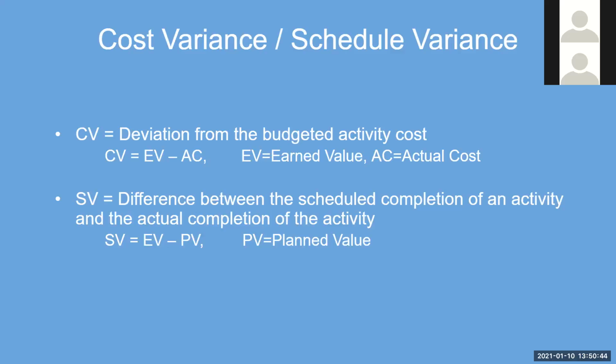But if your earned value, let's say the example I gave, is $200 after 2 months, and your team was so efficient, they spent only $100, that means your cost variance has a positive of 100. You guys have actually saved $100 or 10%. But if it's the flip, the other way around, they weren't that efficient and you had some unknown expectations and they spent 400 instead of 200, then you have a cost variance of negative 200, which means you're 20% behind on your cost.